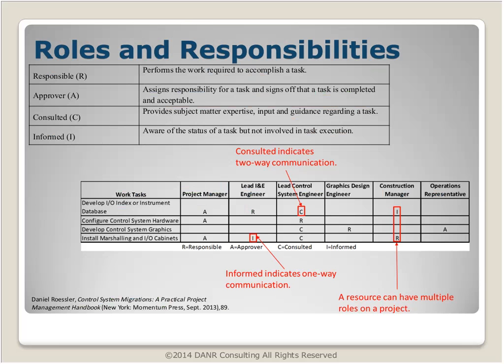And while some people may consider the RACI designations a little bit of overkill, they can be extremely valuable in helping you consider whether you've covered everything and whether there's clarity in people's roles. So for example, if you're creating your RACI and you find a task where it's a gray area, where you're not certain who's responsible, or you look at it and it's kind of a dual responsibility, that's something you probably want to spend some time on in your kickoff meeting, because if you've got questions about who's responsible for that task, I guarantee you that other people on the team will end up having questions about it at some point. So identify those hazy areas early on in a project, and that can prevent confusion and dropped balls during later stages of the execution.